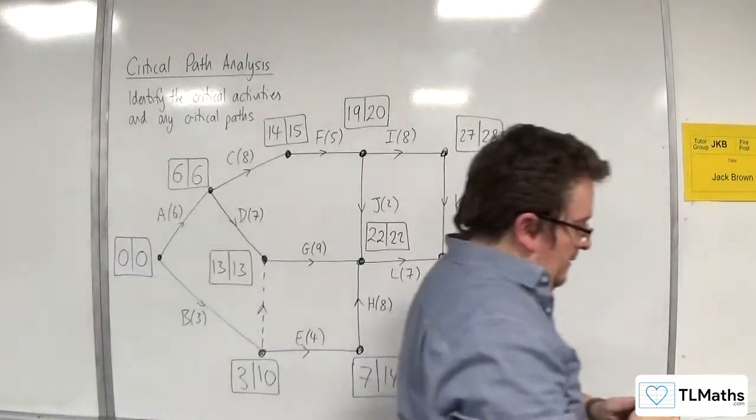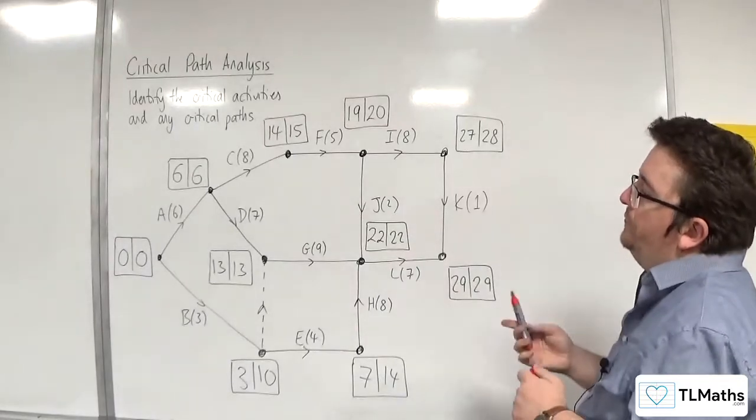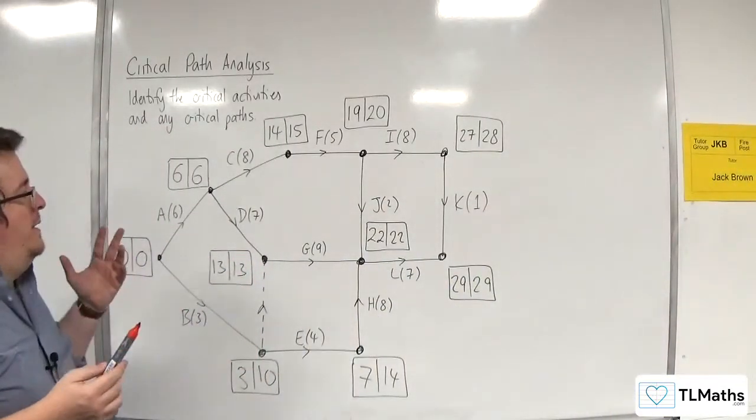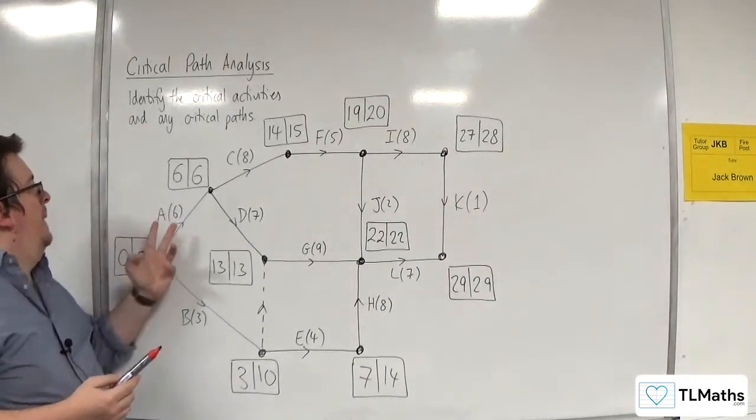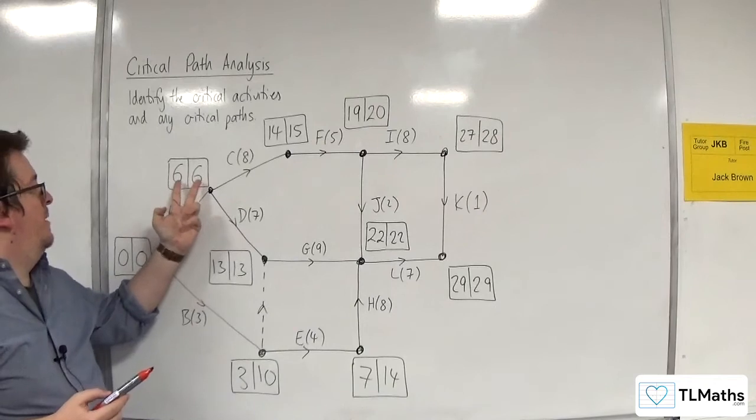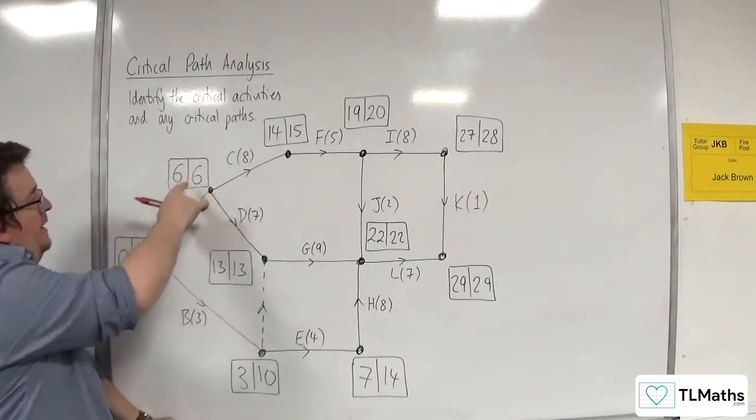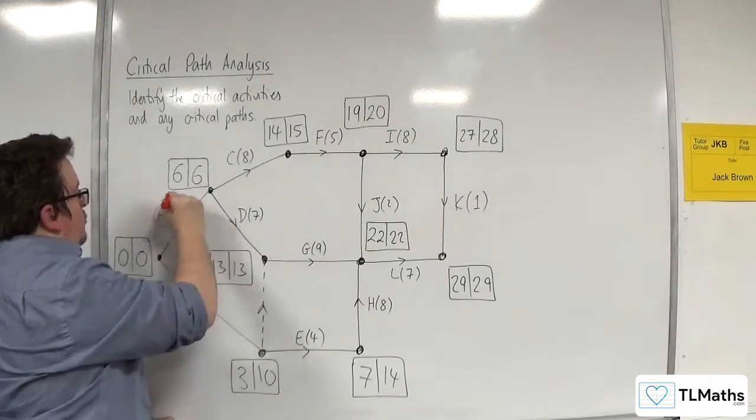Right, so now that we've got that, we now need to identify the critical activities. So you're looking for activities where the start node has the same pair of numbers, and the finish node have the same pair of numbers. And also, that 0 plus 6 is 6. So this one is definitely a critical activity.